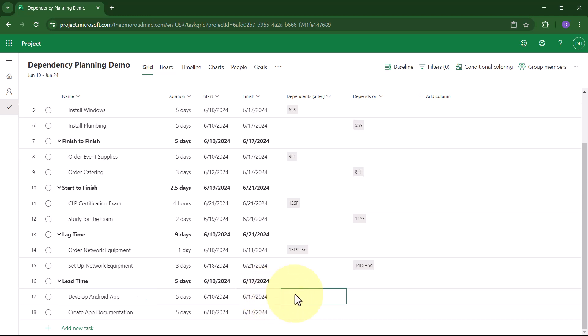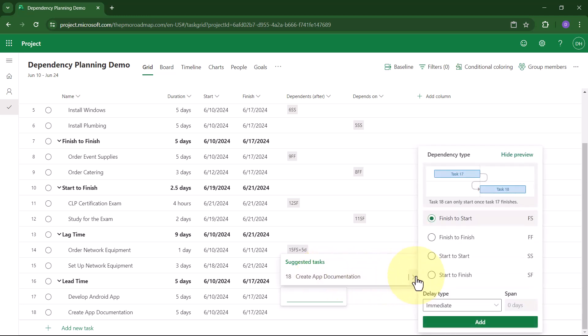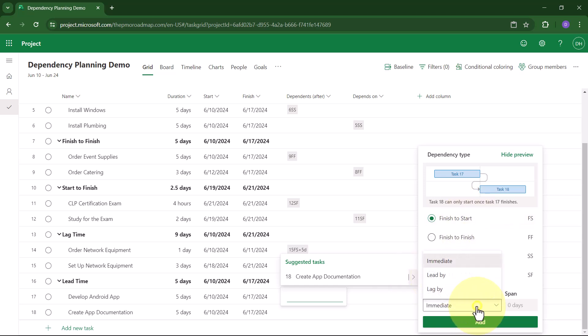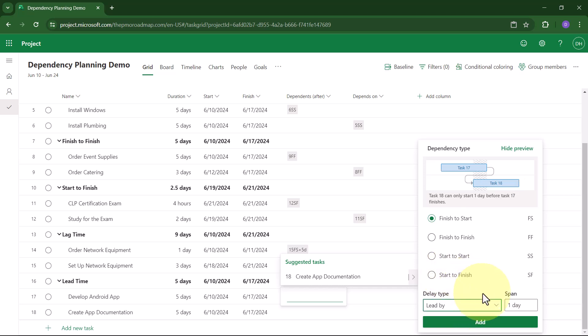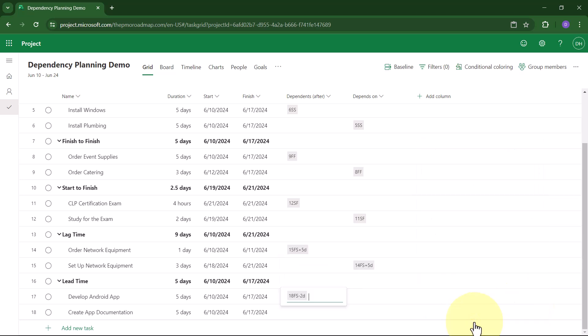So here's how to set that as well. I'll select Create App Documentation. I'll pick the Fly Out button. I'll leave it set to finish-to-start. Delay Type. This time I'll choose Lead By. The span on this will be two days. When I click Add, Project for the Web creates that dependency.